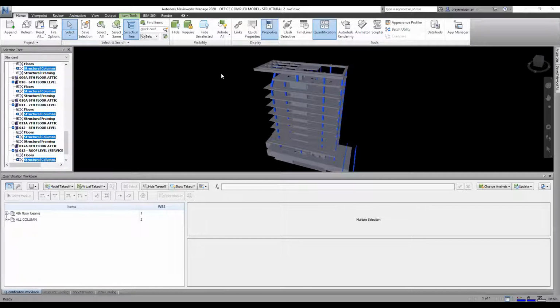Does it take care of reinforcement as well? Yes, like I said, if you have a model for reinforcement, it's possible, but it's very rare, because in this part of the world it's still very rare. But when you have a model for it, you can get the total length of your bars, because the software is going to break it down for you in different diameters, either 10 mm, 12 mm, 16 mm, and the like. So since it's able to break it down for you, you can easily generate your quantities for reinforcement if you are not given a reinforcement schedule. Okay, I think that is fine.